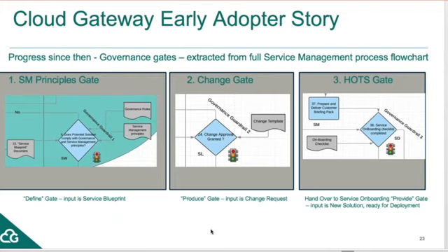So that's an early gate, as you can see by the traffic light symbol on the left. Once we've gone through that gate, a lot more work takes place, more marketing takes place. My service manager will join the people to go and bless you, whoever that was. Our marketing people and service manager will start to collect some use case information from the customer, so we know what they're going to be using Cloud Gateway for and why, so we can understand the impact to them of a failure, and we can link that to our SLAs, to our incident management severities, and to our user acceptance tests. So collecting the customer information, the consumer input, if you like, very early, and using that as the theme through our support model is very important.